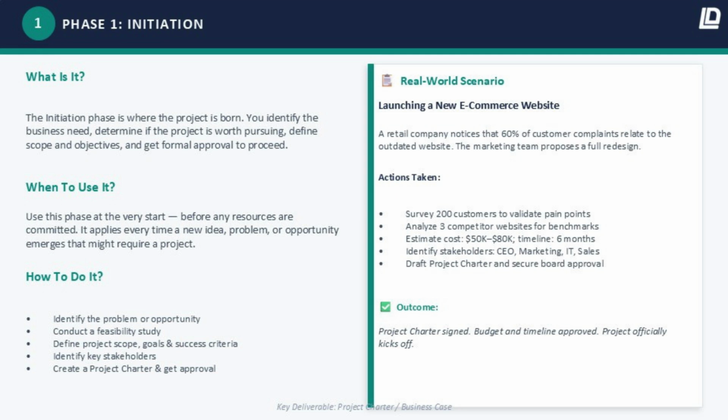So, what is initiation exactly? Initiation is where the project gets its foundation. It's where you identify the business need or the problem you're trying to solve. It's where you conduct a feasibility study to determine whether the project is actually worth doing. It's where you define the scope, in other words, what's in the project and what isn't. And it's where you secure formal approval from the stakeholders who have the authority to greenlight things.